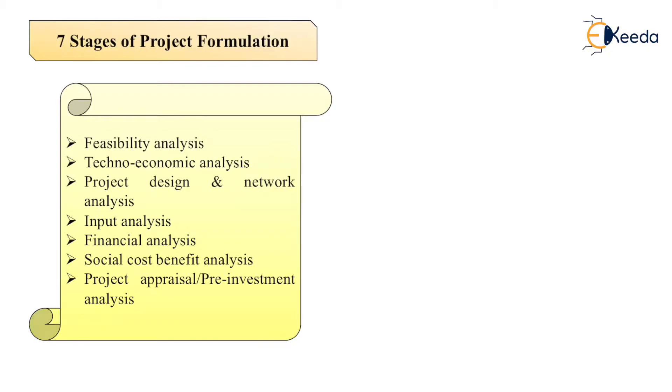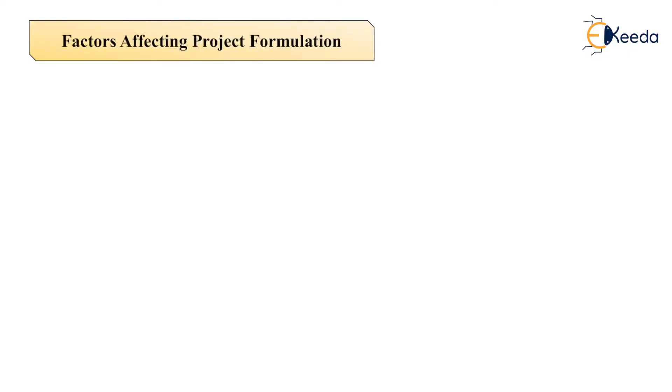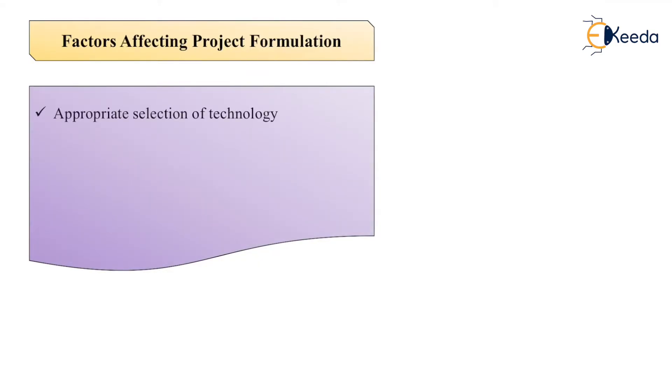Now what are the different factors which affect the project formulation? First factor is appropriate selection of technology. We have to select the appropriate technology because we have numerous technologies which are performing the same tasks or giving the same benefits, but we have to choose the appropriate technology. Then influence of external economics, qualified personnel, resource mobilization, knowledge about government regulation - this is very important, otherwise the project will go in loss - and some other factors related to nature or related to the society.